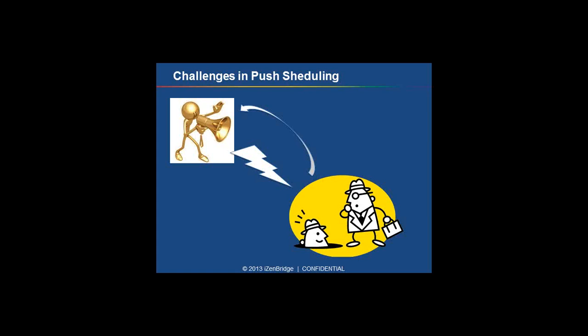For example, in the previous critical path, I was showing that testing will happen once I am done with the development of feature 1 and feature 2. There may be a case that feature 2 is facing some issue or some details are not available, and these two things cannot be tested together. Now your workforce will remain confused until you, as the project manager, give them the modified instruction. So in push-based scheduling, whenever the workforce faces uncertainty, they look towards a manager to provide modified instructions.